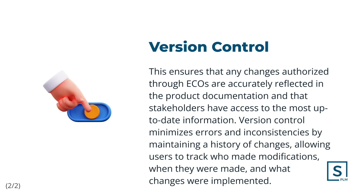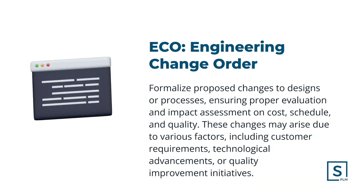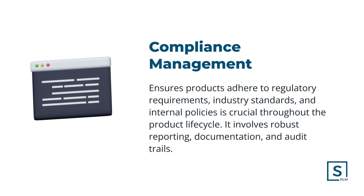Engineering Change Orders, or ECOs, formalize proposed changes to designs or processes, ensuring proper evaluation and impact assessment on cost, schedule, and quality. These changes may arise due to various factors, including evolving customer requirements, technological advancements, or quality improvement initiatives.